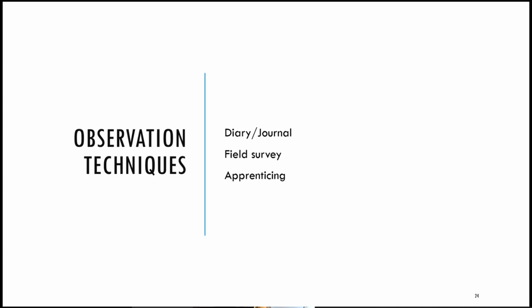If there's time, you can also do a field survey. Sit next to or behind the user and watch for yourself what, when, and how often they do what. You get a better feeling of the user and where the focus in their everyday work lies. If there's even more time, you can also use the apprentice technique. You are the apprentice again for the work of the user, and they have to teach you. So you can do partly their work. There, you get the best understanding of what they are really doing.